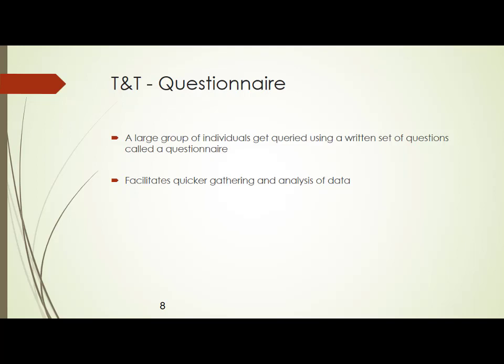So your stakeholder register mentioned that there is a stakeholder called operator. Now you come up with an idea that for all the operators, I have to use a technique called questionnaires in order to collect the requirements from them, because you found out that there are hundreds of operators in the organization, and there is no point in conducting one-on-one interviews for all of them, because their requirements would by and large be the same.